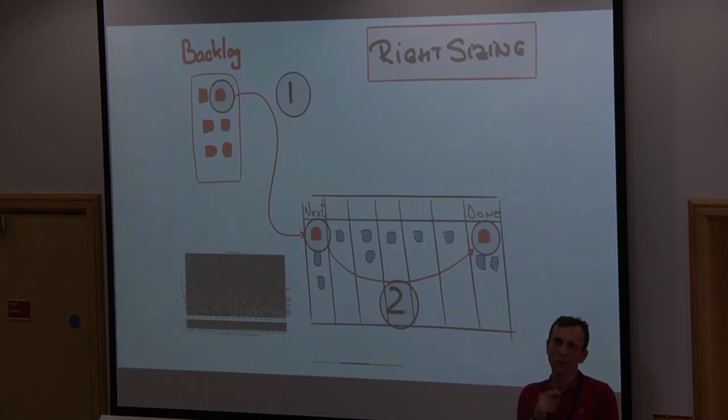And then what we do is, we ask the team, do we think, can we complete this item in 27 days or less? If the answer is yes, we commit to product owner, to the client, that yes, we take this item and complete it. If the answer is no, we pause. If you knew up front there's a strong likelihood you're going to miss the SLA, you might not consider whether you're bringing it into your work system or not. And quite often, we find ourselves that we could not build this item in that given cycle time because of a dependency. Maybe somebody else had to do something and we knew it takes more than 27 days or less. Then you have some very simple tools to say, well, actually, I'm not picking it yet. I'll wait another week to see if that dependency has moved. Conversely, if the item is too big. So, for instance, if I pick an epic, for instance, or a post-it story, then we break it down up to a point that we get an item that we feel confident that we can build in 27 days or less.